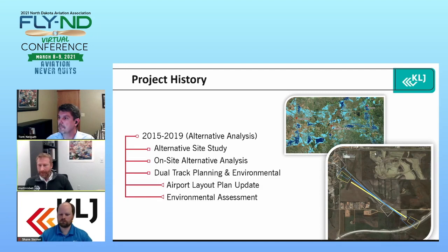Does it have any infrastructure that would limit or make it too costly to construct there? And it became obvious pretty quick that looking for developable space in the Watford City area is a tough challenge. I mean, most of the developable property was spoken for. We had a couple promising sites, only to drive there and see new pipelines getting put in, or a gas plant in one instance. So it became obvious that there weren't any great sites within close enough distance to Watford City to be workable. So then we went back to the drawing board for the existing runway site again.